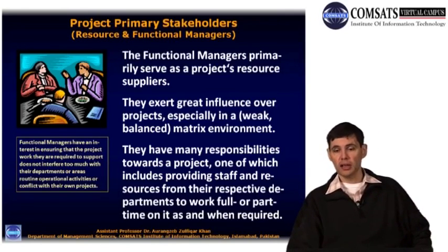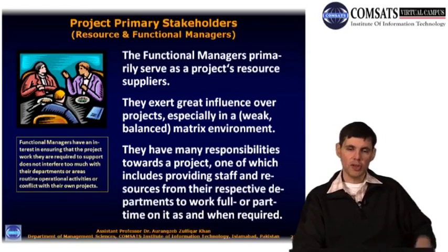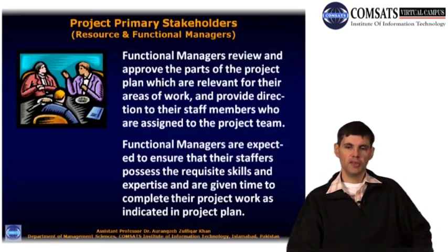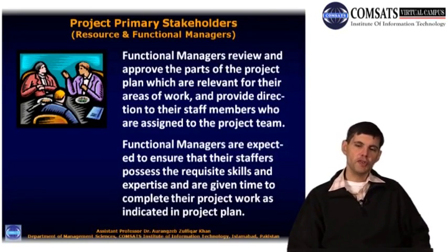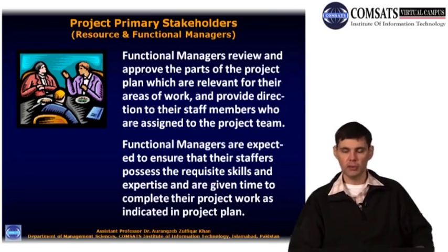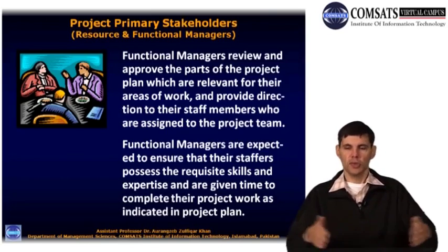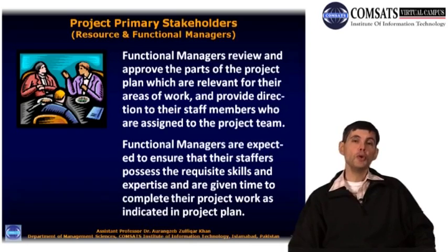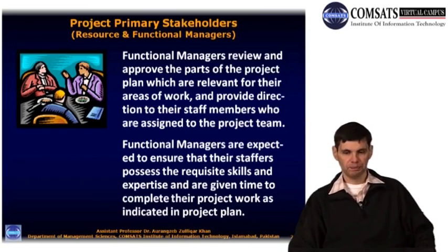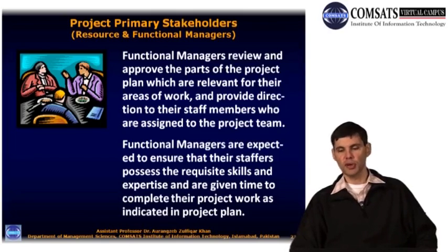So they have got a big stake in all the projects which are taking place, because such a large chunk of their resources are invested in those projects. Some of the specific responsibilities of the functional managers with regards to the projects which they are involved in, whether they are within their divisions or departments or whether they are across, is to review and approve the parts of the project plan which are relevant for their areas of work, provide direction to their staff members who are assigned to the project team. Functional managers are expected to ensure that their staffers, who are working on the projects, possess the requisite skills and expertise and are given time to complete the project work as indicated in the project plan.